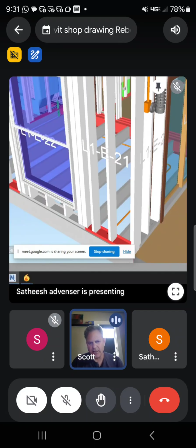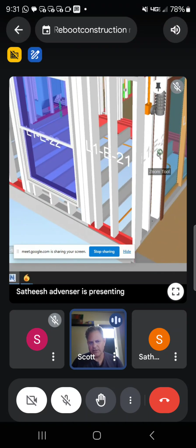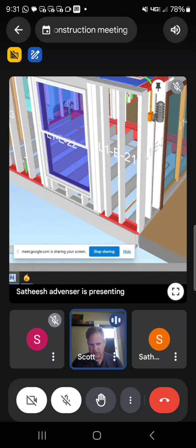Let's talk about plumbing. Let me go back to plumbing. So we give them the right appliances and stuff, and then we're going to get these nice drawings coming back. But also, I'd like it to be a little more sophisticated in our parts list, so you and I can just pick up the phone and order. When we're ordering, we're going to be ordering bulk, right? Bulk items, 20 feet long or whatever.